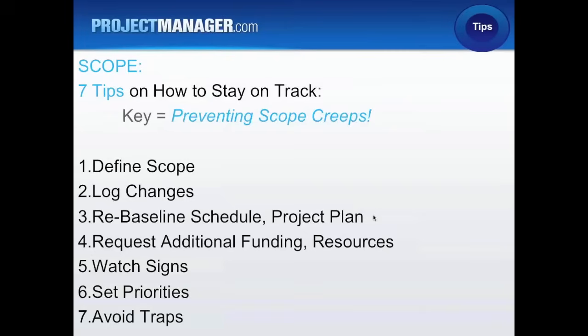If you have to do that, it's good to do it early and often. So as soon as you know it, then you've got to request the additional funding, because as you know, in most corporate environments, there is a process that has to go through. A lot of times the project managers, if they think additional funding is going to be needed, wait too late, and what happens is the funding can be approved, but because there is a process, it takes longer and can delay the project unnecessarily.